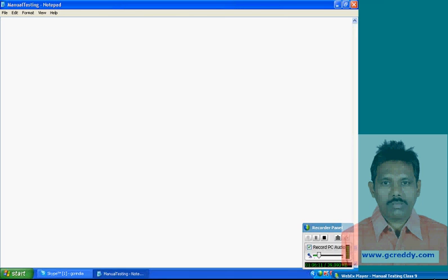Okay. Whereas entry criteria for test execution is readiness of environment, that is test lab and all, and readiness of application under test, requirements, test case documents, test data that is input for testing, and defect report template. Good.